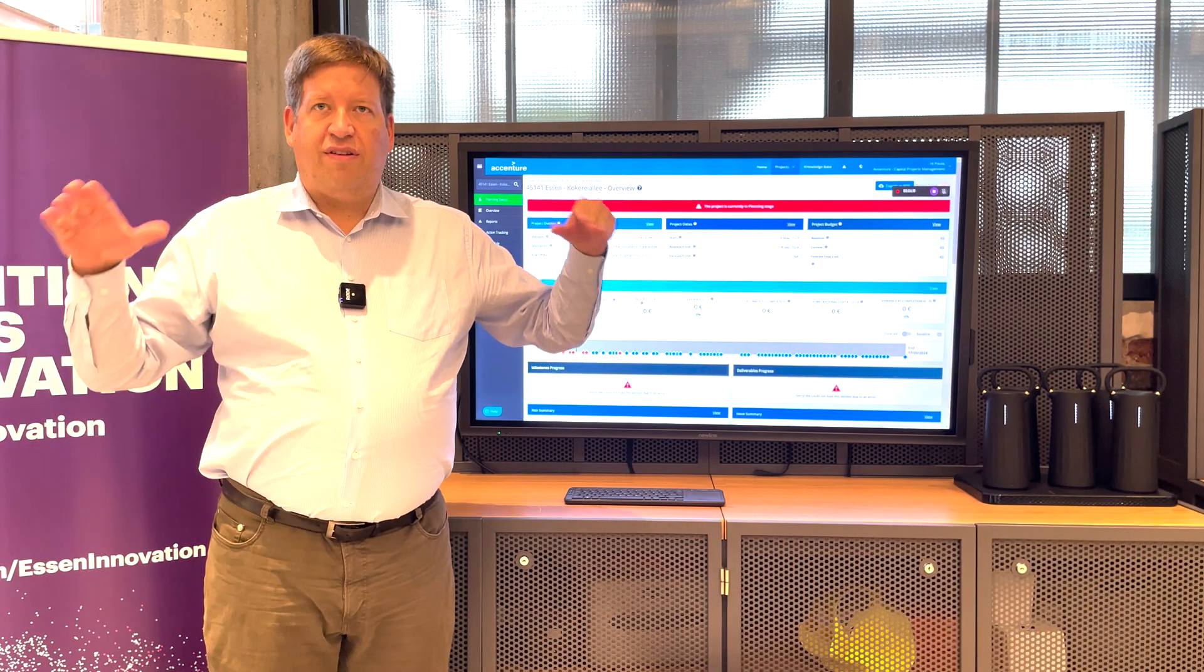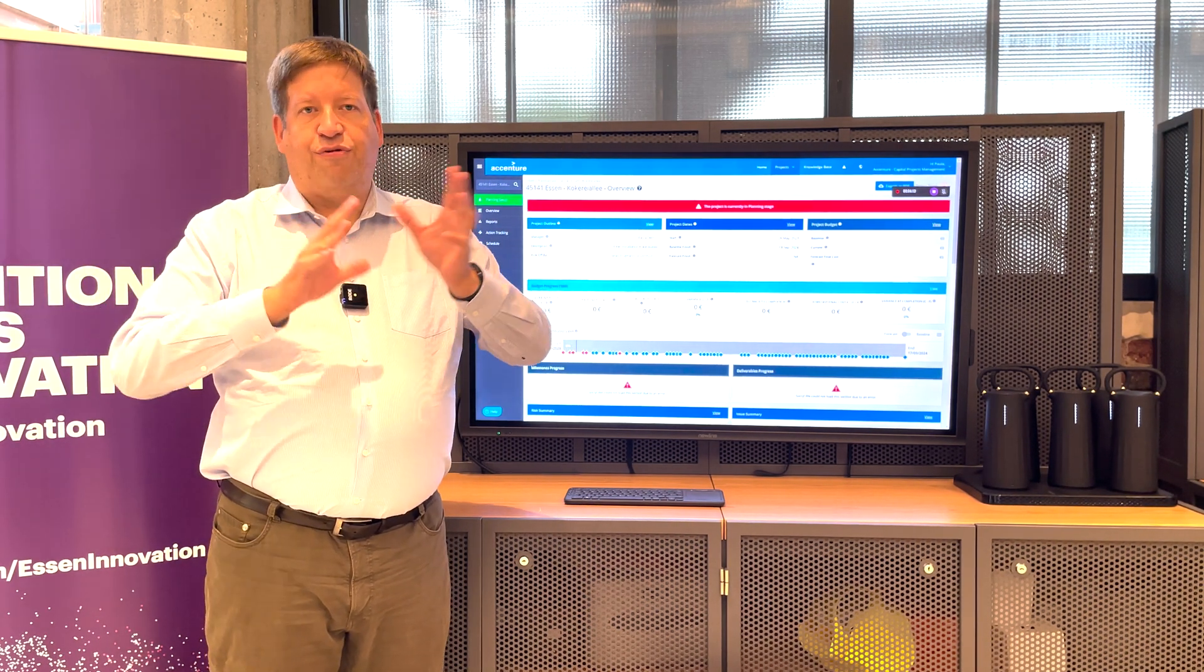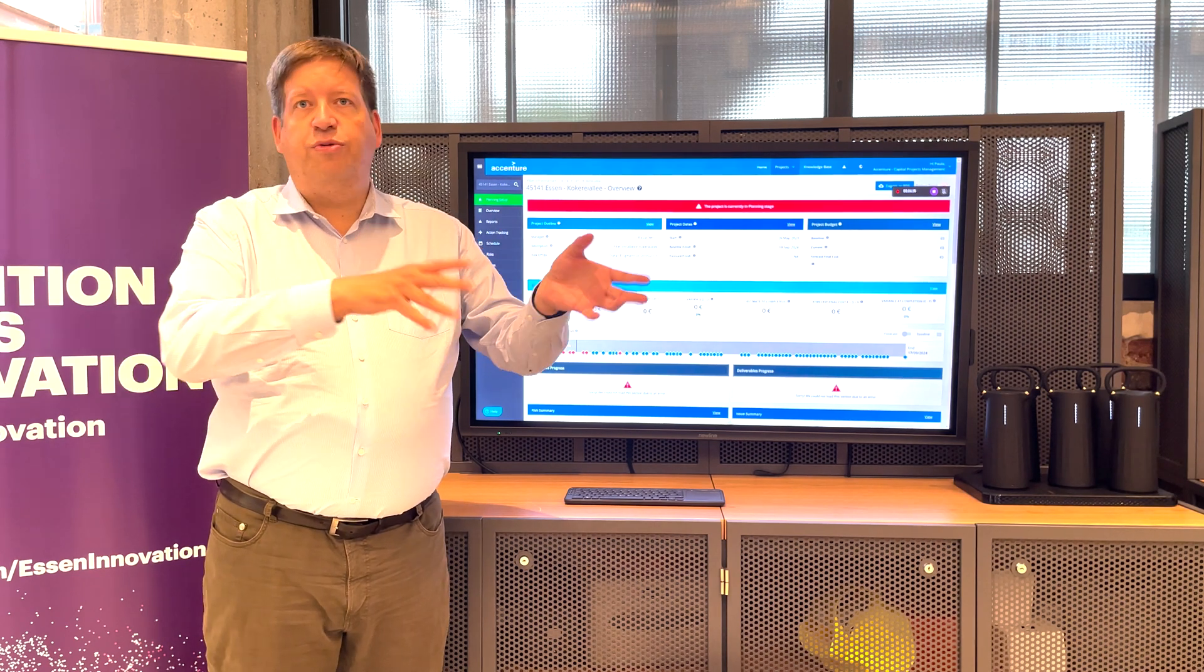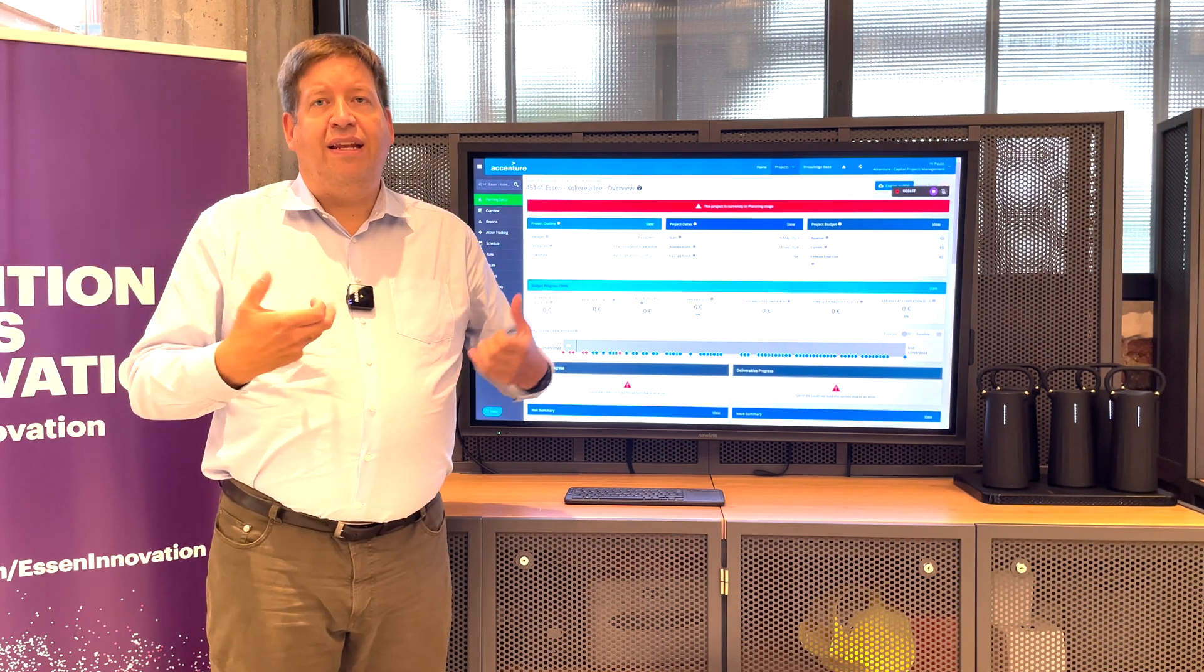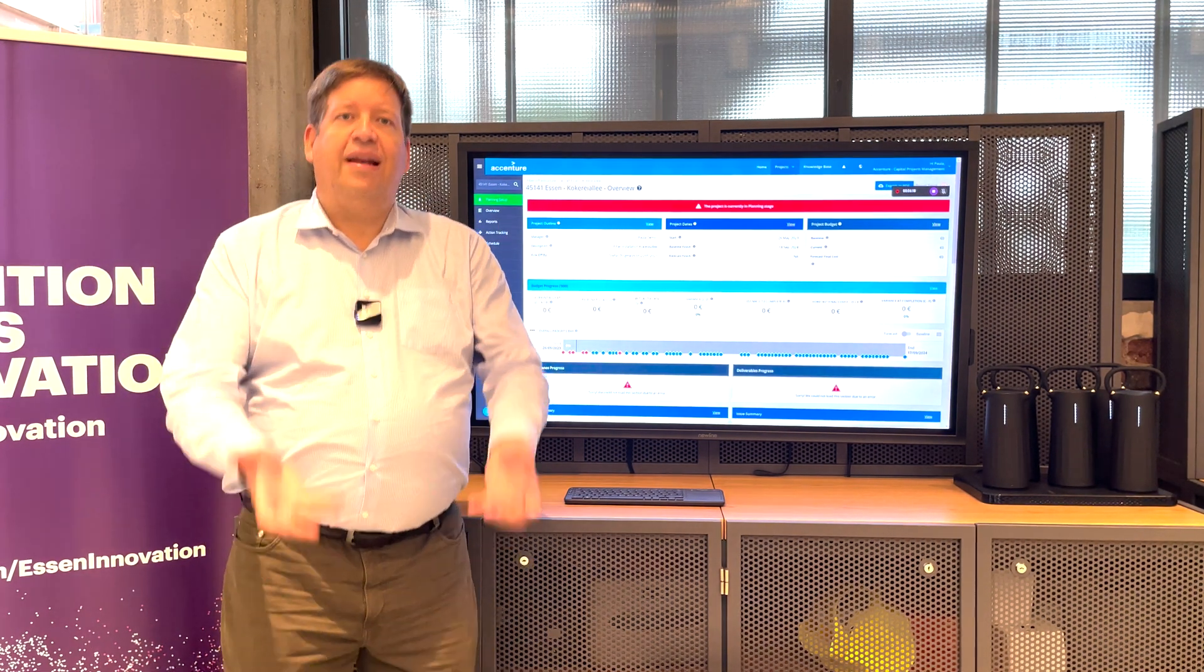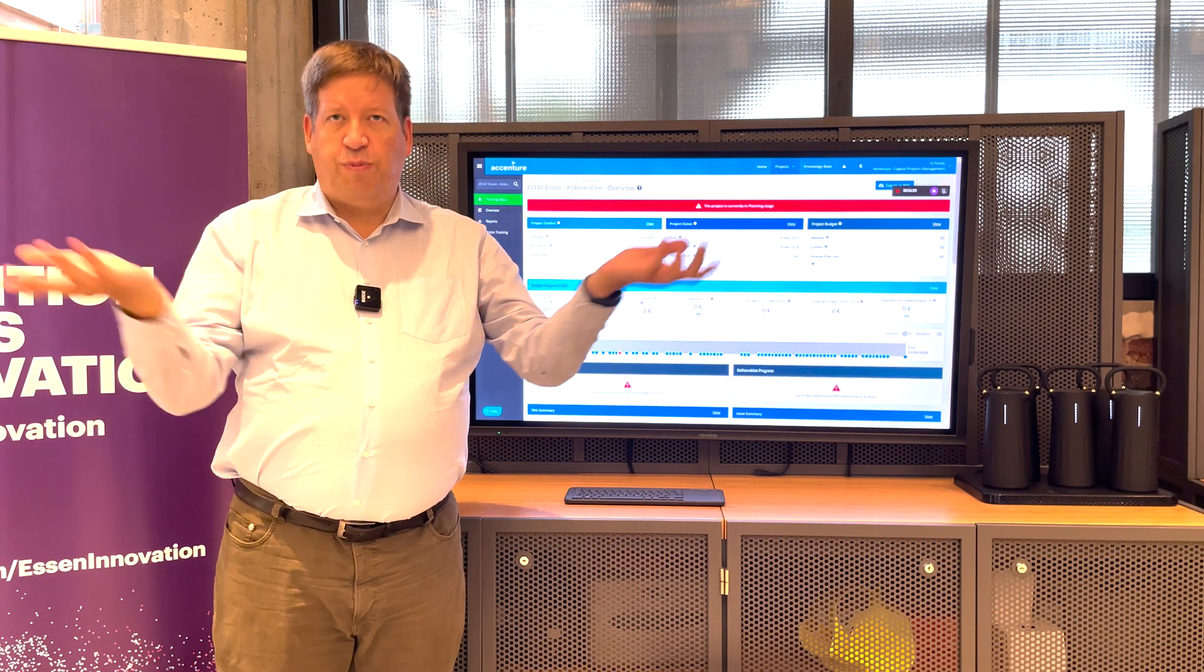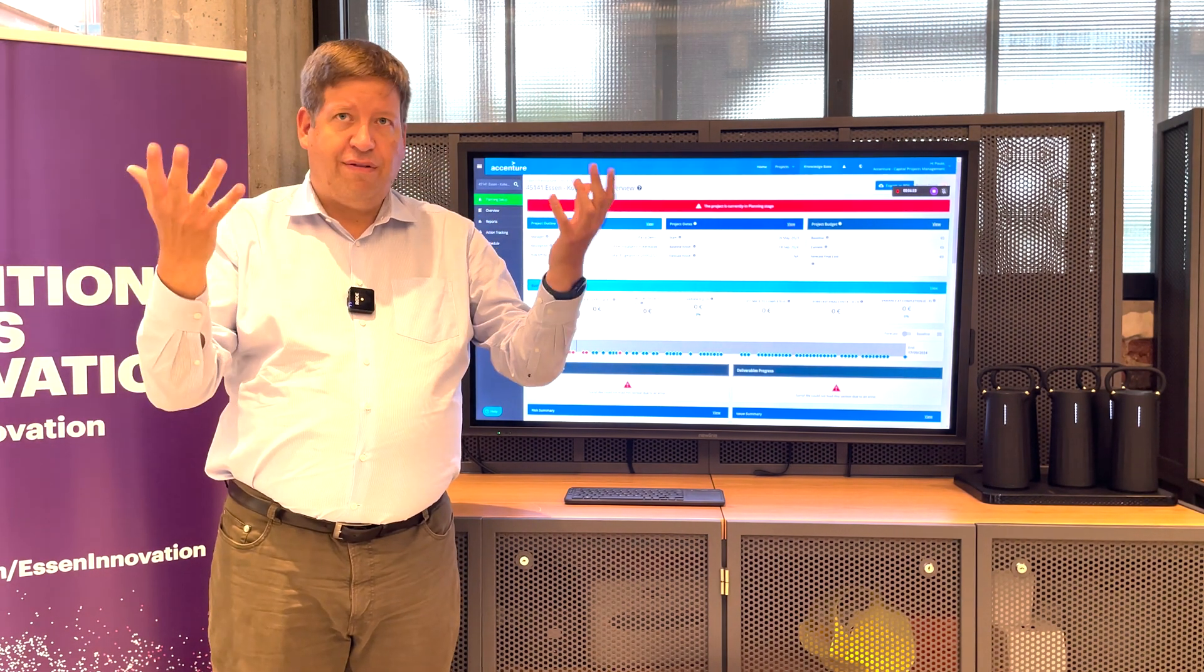So, you can build all of these different layers, you can assign different roles to it, who is responsible for updating it, and then you consolidate it up into an overall project level or program level.